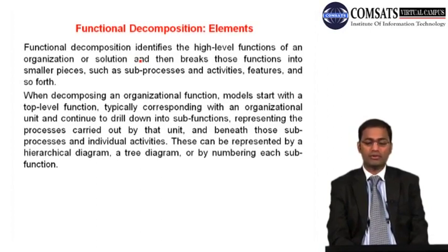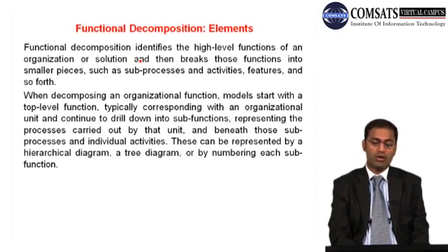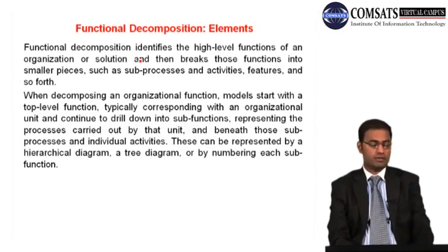When decomposing an organizational function, models start with the top level function, typically corresponding with an organizational unit, and continue to drill down into sub-functions, representing the processes carried out by that unit, and beneath those sub-processes and individual activities. These can be represented by a hierarchical diagram, a tree diagram, or by numbering each sub-function.